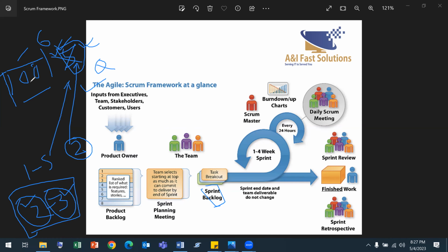of this 100. Now, if you can see, 2 weeks, 5 items, right? So how many sprints do I need to complete the whole project? 20 sprints, right? 100 divided by 5 is 20, and 2 weeks for each sprint, so it's going to be 40 weeks to finish that project. That's how they calculate the backlog items, or how they do the budgets based on the project and the timeline. Each and every company follows this.